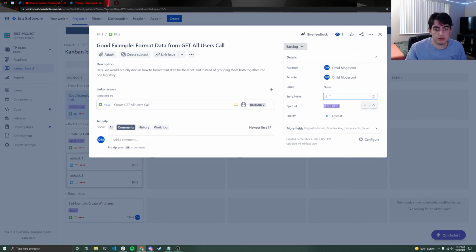So if you create a story that's like 4 story points, that's saying this thing will require 4 hours worth of work. And we'll talk about how to break these up later, so that you should never go over a certain story point value in your stories. But this is an easy way for you to estimate how big of a sprint you have coming up for the next week, and also ask your developers and designers, hey, how many hours do you have for this week?